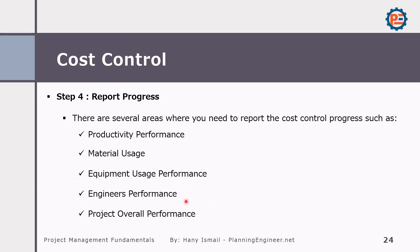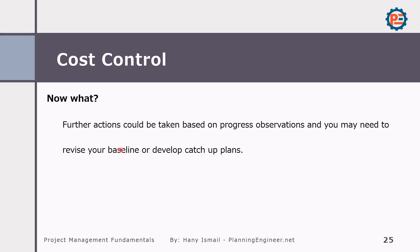We can also evaluate engineer performance by linking the scope of work for every engineer and measuring their productivity, material, and equipment usage — a very good evaluation criterion. Then we can make a project overall performance report. Further actions can be taken based on progress observations; you may need to revise your baseline, develop a catch-up plan, or investigate if something is going wrong in a certain area, floor, or building of your project.